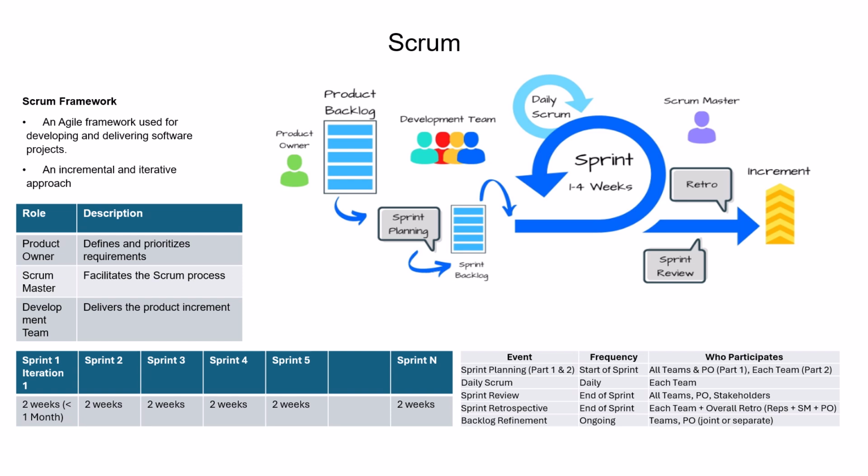So on the last day, which is the 10th day of the sprint, the development is finished. Now this is where they bring the customer, and they meet with the customer and run the software they developed so that the customer sees it in action. If the customer has any changes they want, they will tell the team what they want changed. So in the next sprint, the team goes ahead and makes those changes the customer requested. This is what's good, because every sprint you meet with the customer and you show them the software you developed.